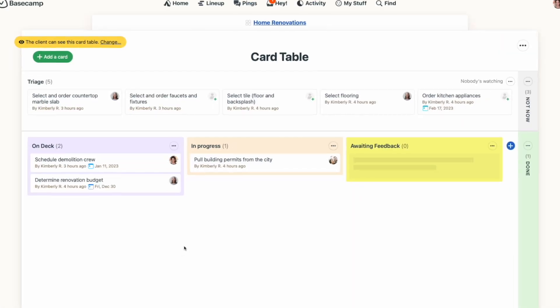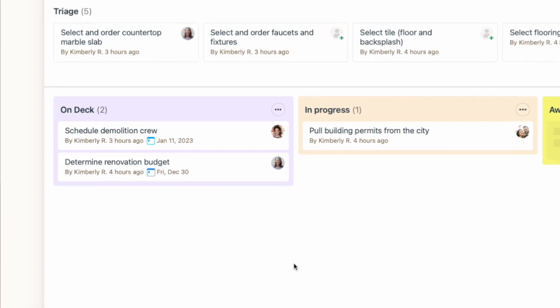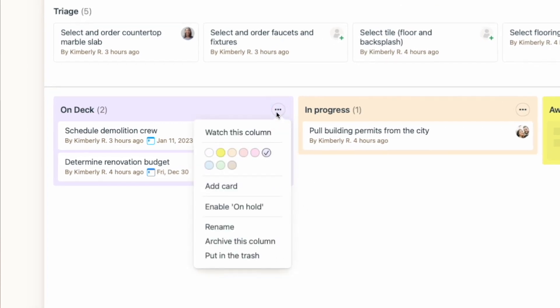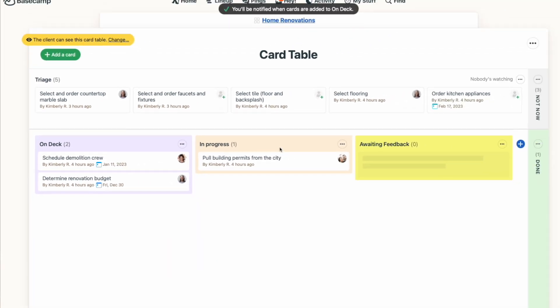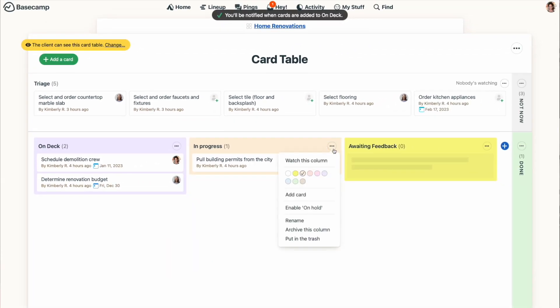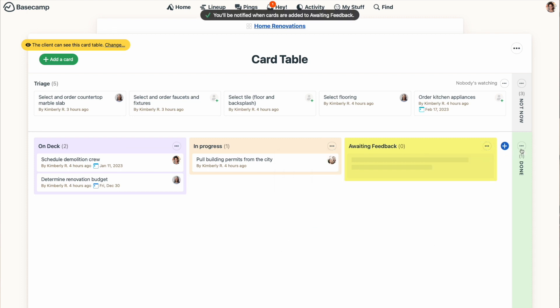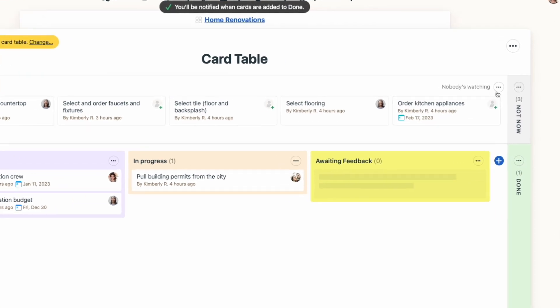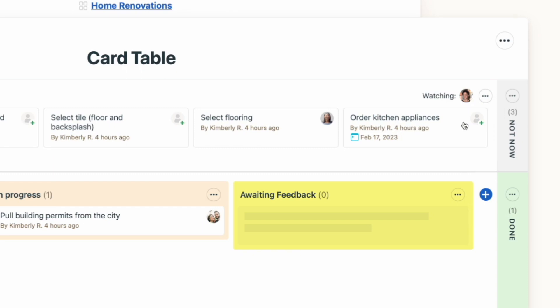Notifications with card table are simple. If you want to be notified about the status of cards as they move along the process, just click the three-dot menu and select Watch this column. You'll receive a notification in your Hey menu when a card is added to this column, so if you want to follow along the full progression, you'll want to make sure to watch each of the columns on your card table. You can also watch the triage section, so you know when cards are added to that section as well.